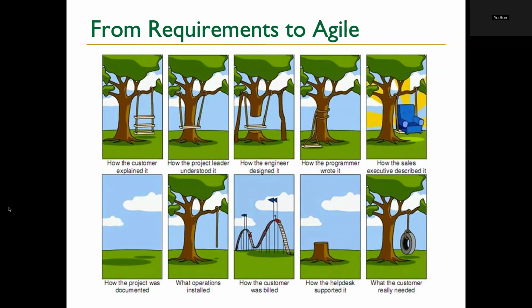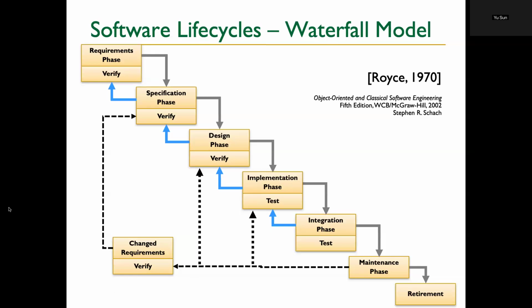So that's the fundamental way to solve the problem, which is to break this giant waterfall model into smaller waterfall models. Instead of planning a whole year with just these 5 stages, each stage takes 1 or 2 months, and every month we go through this whole complete process.